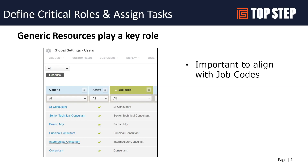We generally recommend a one-to-one relationship, though it's not a requirement, where you create your generics and align them to job codes. That job code becomes the key element common to both the generic and to users. Later in the presentation we'll talk about swaps or searches, and if your generics are set up correctly, those become much more powerful for aligning generic resources with named resources you may use in your projects.